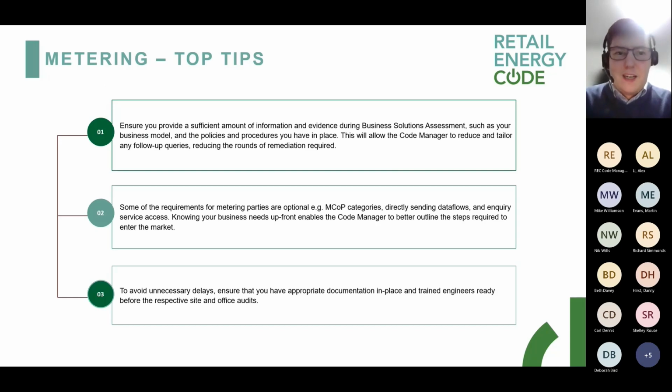I think finally, I definitely recommend that you have appropriate resources in place so that you can meet the market entry audit requirements. Let's take MOCOP, for example. You complete the BSA, you get ready to start the HQ audits, but then you don't have all the documentation ready, or you don't have people available to coordinate the office audit. Then, if it takes too many months, if we're waiting too long, some of the elements of your BSA may become out of date, and you have to redo some elements of the BSA, and it just extends the whole audit time frame.